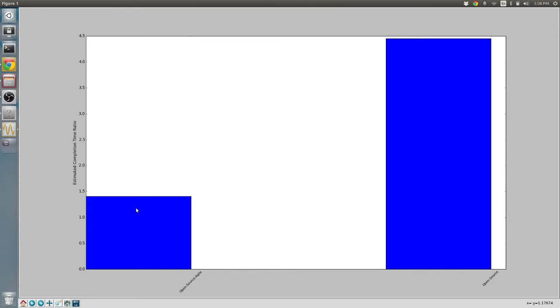So we planned to complete it maybe September 10th, it was done on September 10th. If we gave a project 10 days to complete it, and we completed it in 14 days, and we only had that one issue, we would get a value of 1.4, meaning that we just took 1.4 times the amount of time that we expected. In this case, it's 1.4 on average. So 1.4 on average isn't too bad. And this is kind of what we would expect from seeing an open source project with no deadlines. We finished things in 4.4 times the amount of time, which is pretty massive.